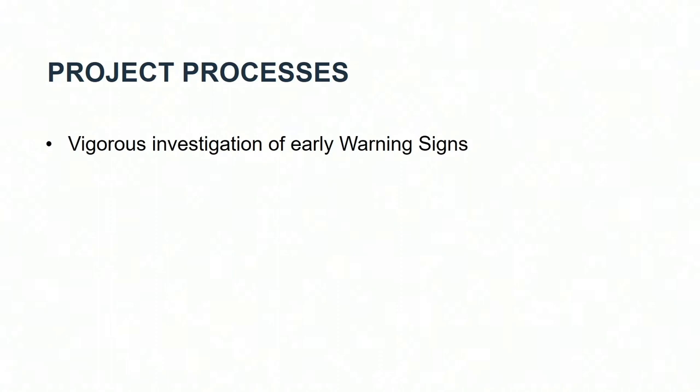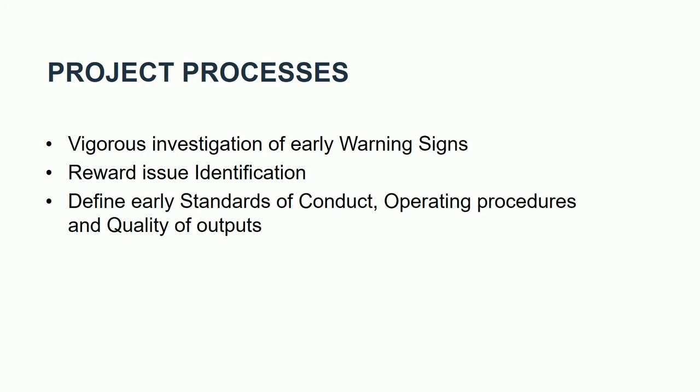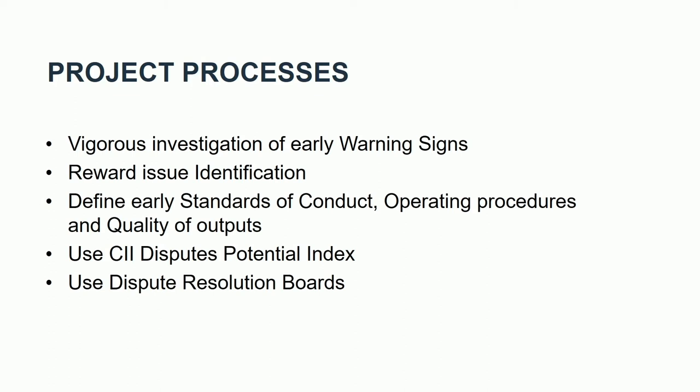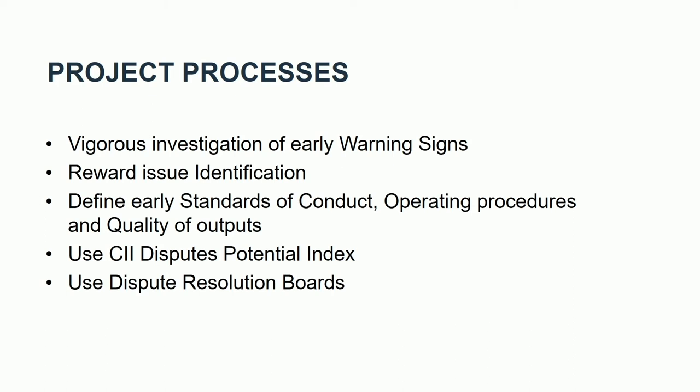In project processes, the theory is to vigorously investigate early warning signs, reward issue identification, and define project standards early and repeat them. Use the Construction Industry Institute's Disputes Potential Index — they're out of Austin, Texas — which allows you to assess the strengths and weaknesses of both the client's and contractor's project teams. Also use dispute resolution boards, which are very popular and effective in New South Wales for managing projects.